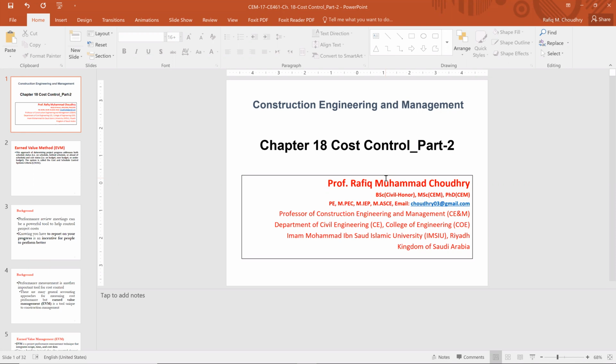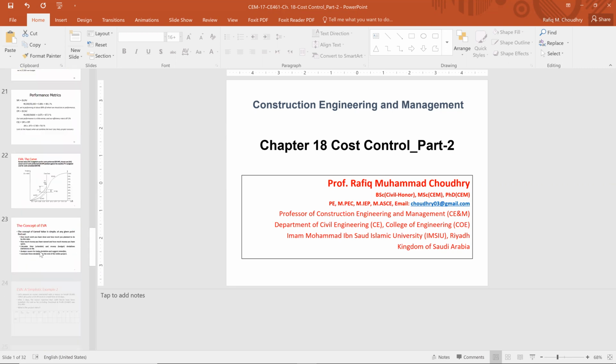In example number 2, we were asked to find out that the project is 28% complete and it is ahead of schedule by 0.6 days after working 5 days, and we can complete 2.14 days early, but with a budget deficit of 2,500.